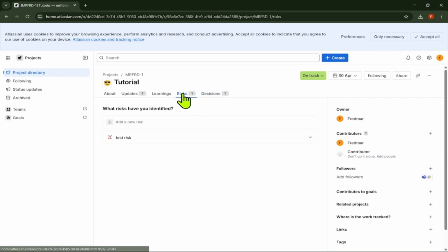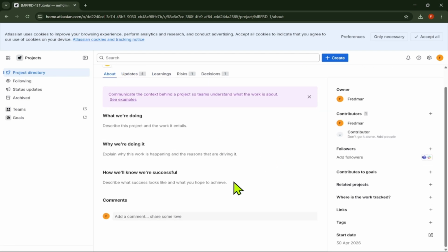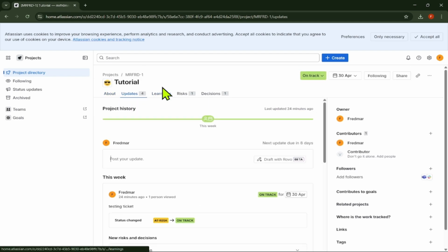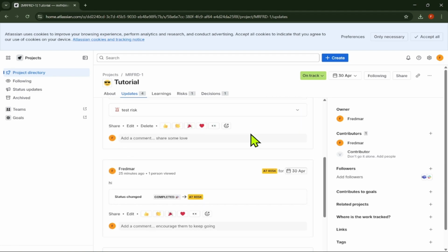Use the timeline to check whether deadlines overlap, work is delayed, or tasks need to be reassigned. You can also use it during team planning meetings to review upcoming work and project milestones. After updating the timeline, open individual issues to confirm the details are correct.